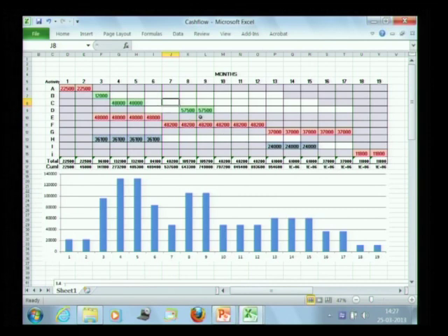So what would be the order of moves? Right now, if I look at what is being over-allocated here, it is C that is loading it, right? And right now, I can't move E at all. The other option I have is to move H. Remember, H can also move, and H has free float on its own.